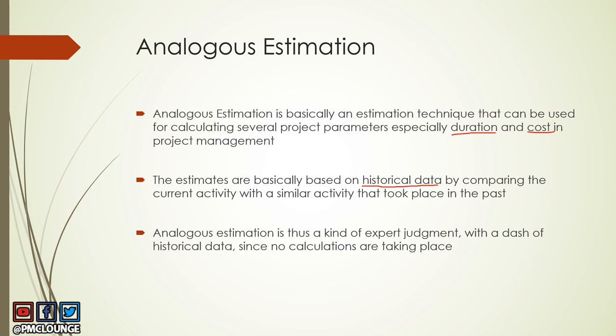This is a kind of expert judgment because you are making a judgment about the estimate, but you are also using historical data. You are not simply looking at the activity and making a judgment — you are also referring to historical data. That is why it is listed as a separate entry in the tools and techniques, distinct from expert judgment, and is called analogous estimation.